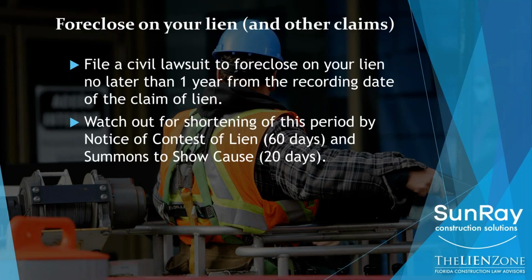There are other ways to shorten this period of time that the owner and the contractor have. Another one is called a summons to show cause. This reduces the time you have to file your lawsuit to foreclose on your lien down to 20 days. Unlike the notice of contest, which is handed to you or sent to you via certified mail, a summons to show cause is served upon you by the process server or the sheriff. It is a real lawsuit naming you as a defendant, and now you have 20 days to file your action to foreclose on your claim of lien. If you miss either of these deadlines, the notice of contest of lien deadline or the summons to show cause deadline, you will lose your lien rights. Your lien will automatically expire, and you will no longer have any right to foreclose on the property.